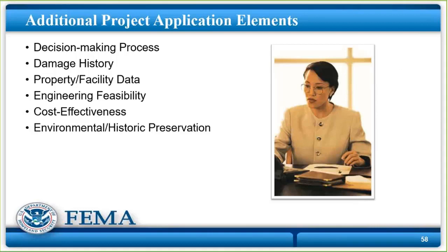Because if it's a project that requires environmental review, the National Environmental Policy Act, NEPA, requires that FEMA, in order to comply with federal environmental laws, must look at the alternatives that were considered to the preferred alternative that is proposed in the project. A typical thing is that one alternative is no action, and the other is some sort of reasonable alternative. One of the examples I use is, say you want to do a buyout. Flood elevation was an alternative that was considered, but was determined to be infeasible.